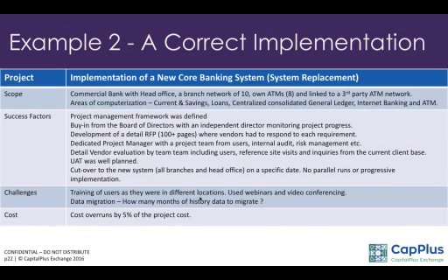They had a dedicated project manager, a team of users, internal audit as well as risk management. So basically the functional people were also involved. Detailed vendor evaluation. They took a long time to do the evaluation. The vendors were given like 3 days to present their system, and they were asked to simulate the workflow of the institution or an improved re-engineered workflow so that they could make their own decisions, whether to stick with those things.